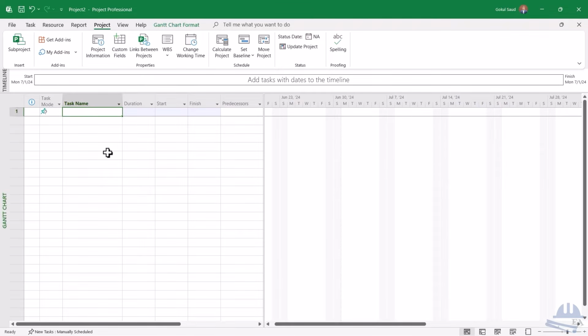Right? You don't have to finish the entire excavation. You have excavated a certain part and you can start the soiling from there, and the rest part the excavator works on, and the stone soiling work also happens parallelly. So you have to imagine all those things, and you have to also think.